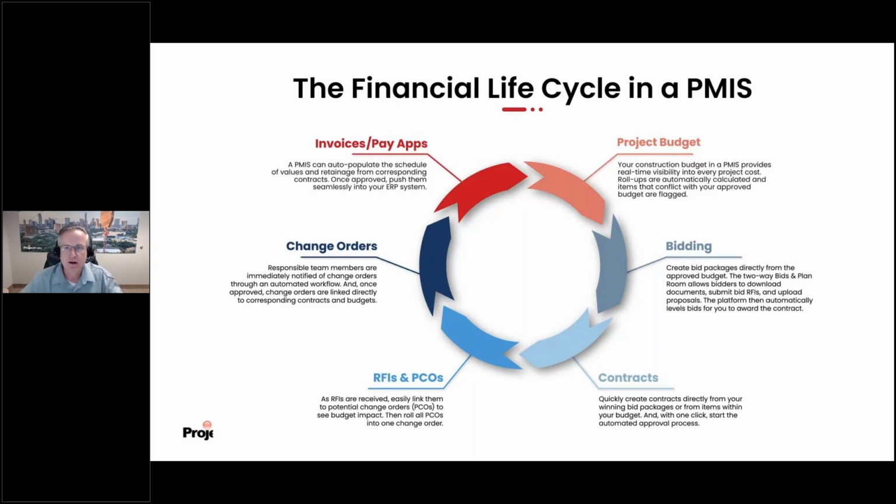And that change order can include all the information associated with that particular project that the contractor, architect, and engineer needs to provide the owner in order for them to make an informed decision about whether they're going to approve that. And then that change order information will be represented as another cost within the budget that can be compared against what's been approved to spend on that project.